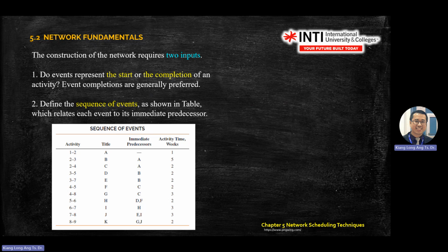This one you read. You already know, and we already covered this one. I only need to highlight the words immediate predecessors. Immediate predecessors means if you read this table, for B, the previous arrow is pointing from A. For example, B's immediate predecessor is A.